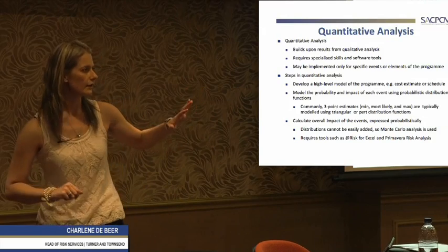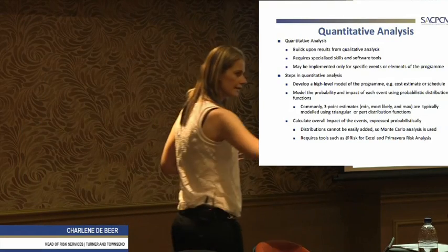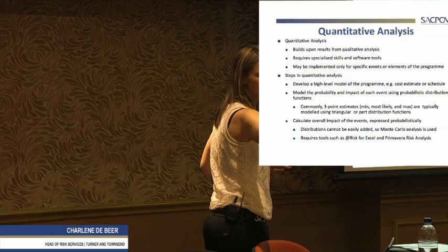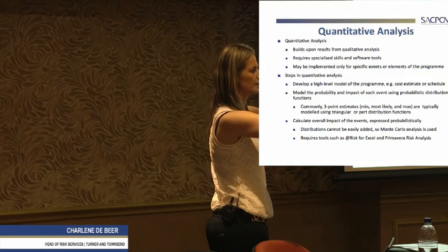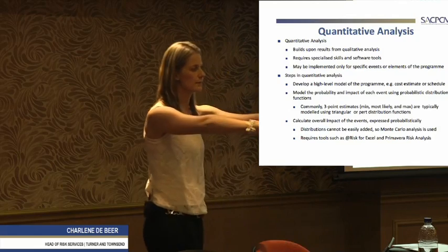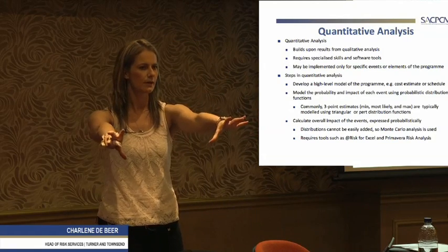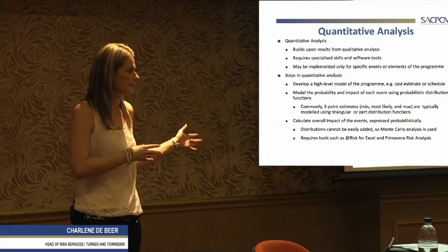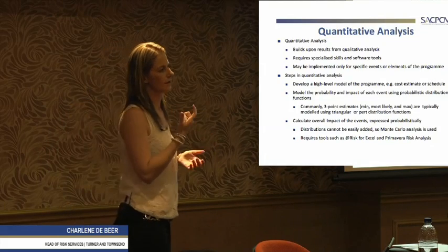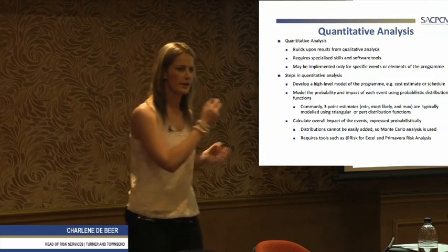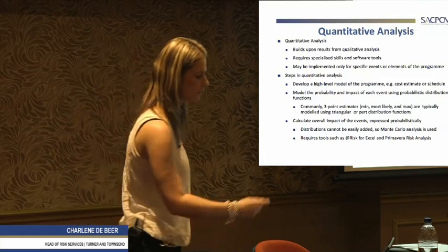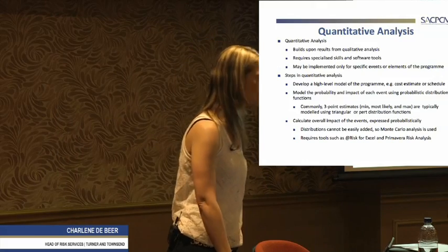It doesn't contain airy-fairy thumbsucks. It contains the cost engineer's costing. It contains the planner's schedule. So if you're telling me this is your budget, these are your areas, and the planner is telling me this is the schedule, and I do a risk assessment and the team is saying, well, we face these likelihoods and impacts, you can't get a closer costing, because you're running your simulation of actuals, which I'll explain in more detail as well. And then we use Primavera Risk Analysis.